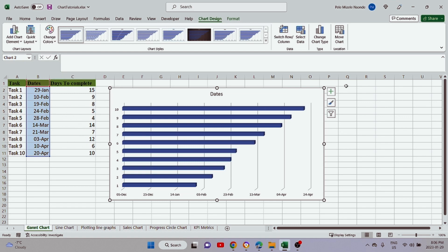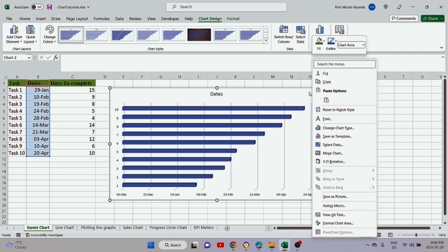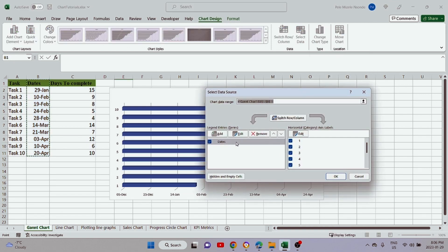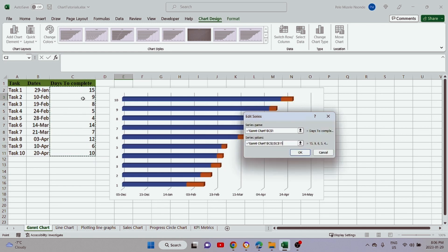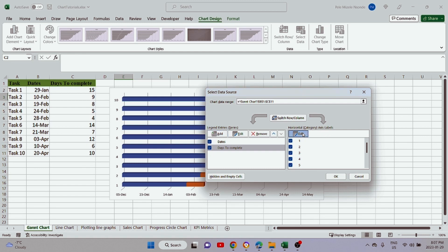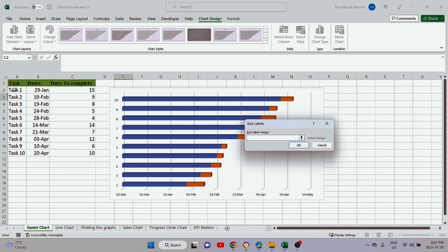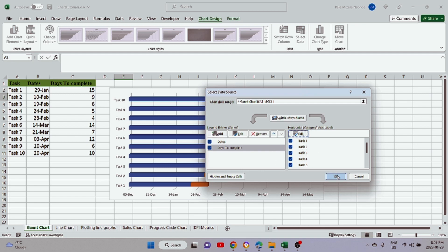Now we need to add the next series. We can click 'Select Data' from the top or right-click inside the chart and choose Select Data. Click Add, then select 'Days to Complete' as the series name. Under Series Values, select all the Days to Complete values and click OK. This time, before clicking OK on the main dialog, we also need to add our task column. Under Horizontal Category Axis Labels, click Edit and select from Task 1 to Task 10. Click OK, then click OK.